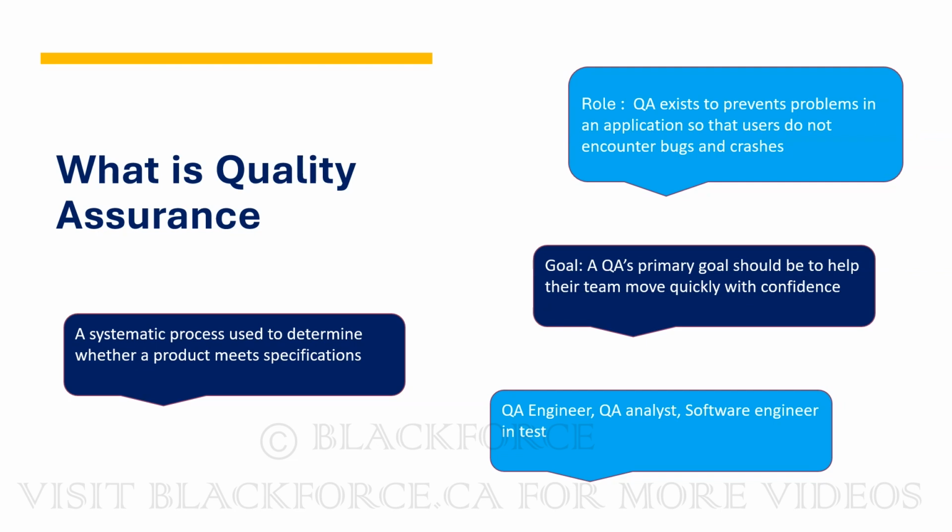The team is more confident, right, for the application to be sent to the user to test. So when the user is testing, that is called user acceptance testing, right? But the team is more confident because they've already tested on their end and they're good before passing it to the user to do user acceptance testing. So anybody that you hear quality assurance testing and all that, they are part of the technical team, but the user acceptance is on the business side, okay?